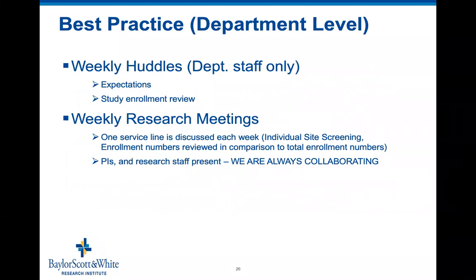Next. Best practice at a department level. We have weekly huddles, which is just our research department staff only. And in each weekly huddle, we set our expectations, what we expect, what the sponsors expect. These are things like we want data in within 3 to 5 days, and queries and monitor actions need to be answered within 5 to 10 business days.